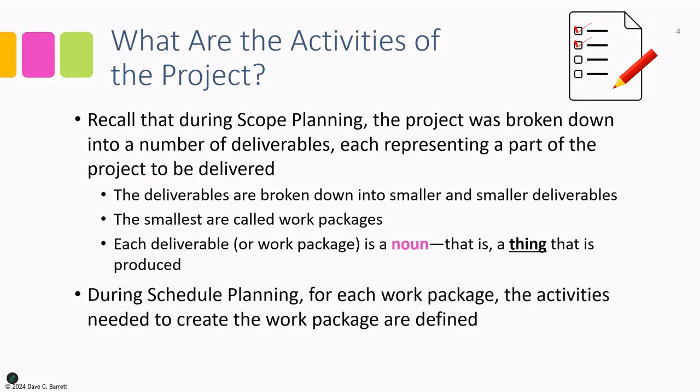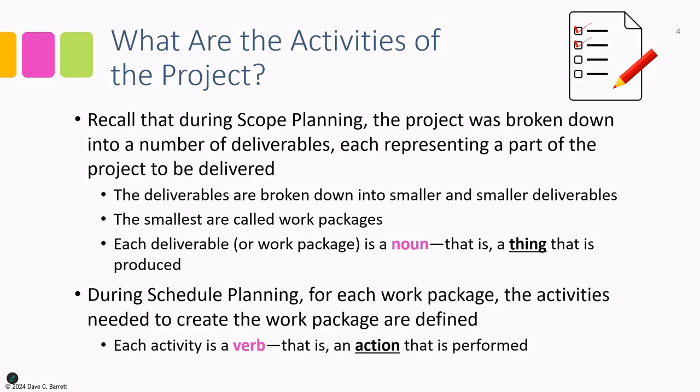During schedule planning, for each work package, the activities needed to create the work package are then defined. Each activity is a verb. That is an action that is performed. So as you move from scope planning, which is nouns or things, deliverables, to schedule planning, where you define activities for each work package, you're defining verbs, actions that are performed, and that is the process.